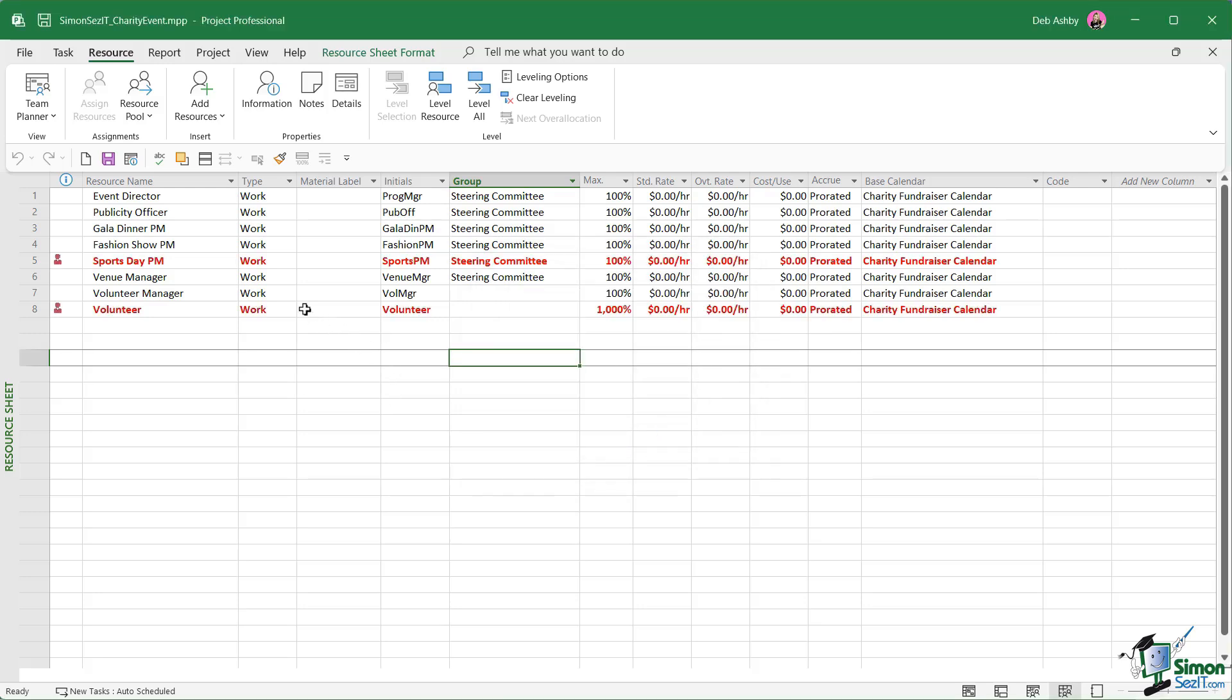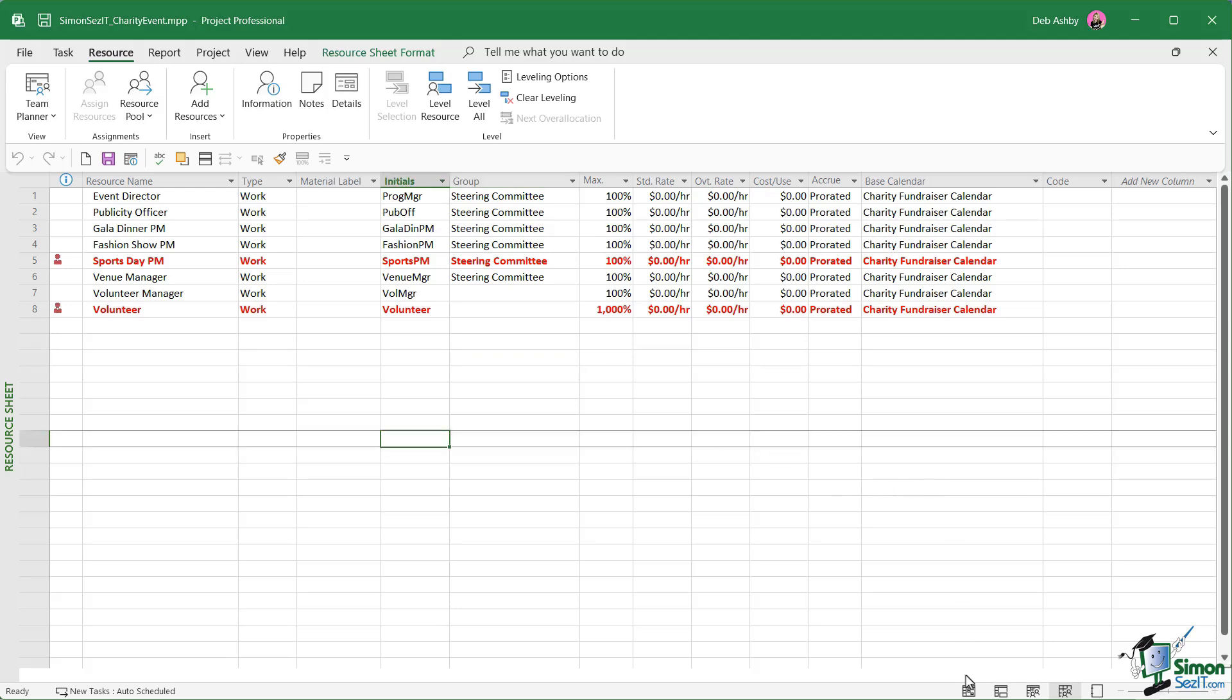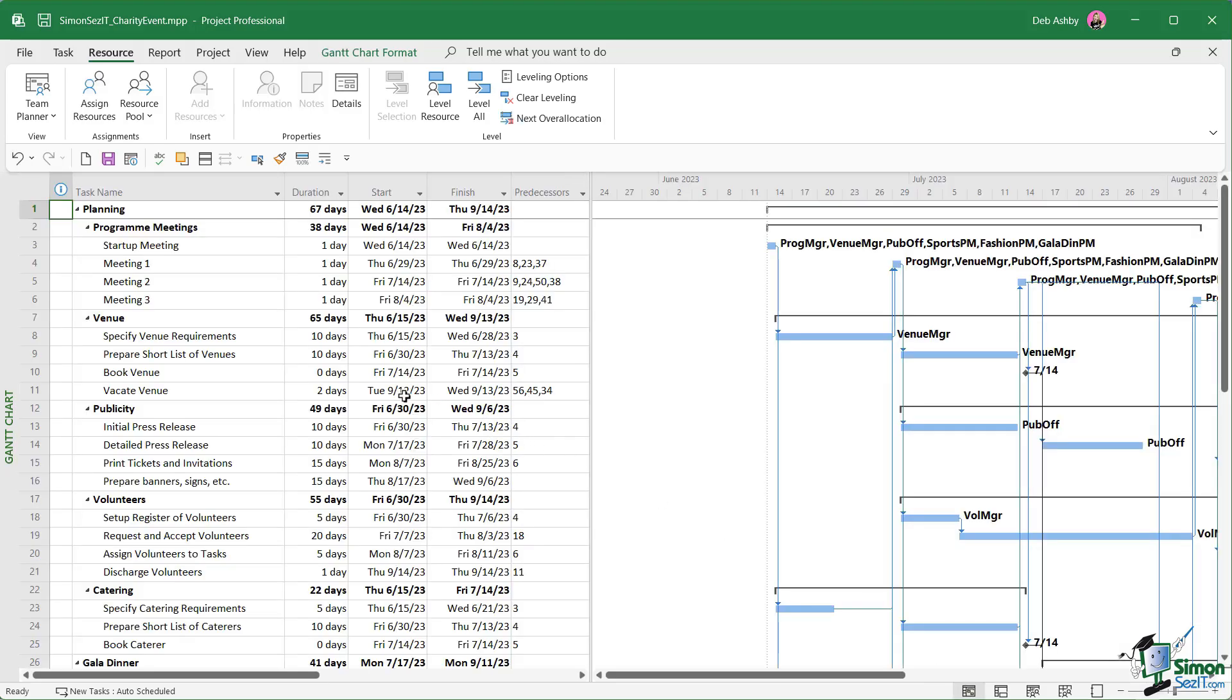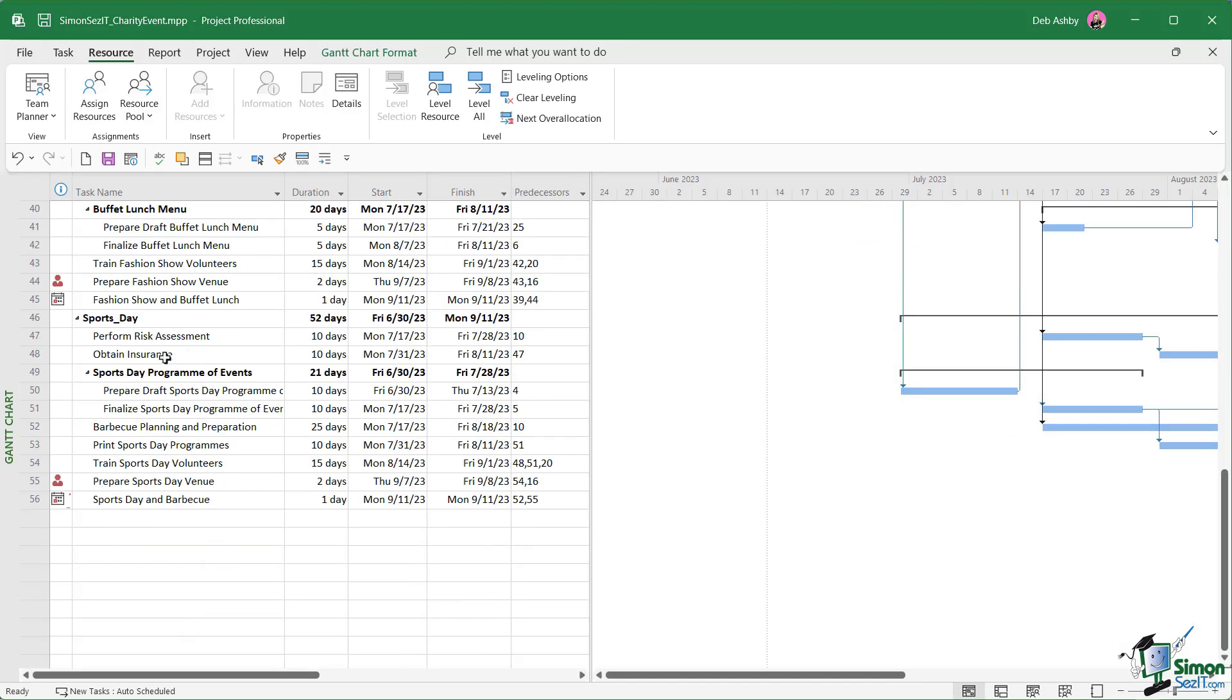That's really related to the fact that we have the sports day event in two different files. If you recall, when we copied the tasks across, we didn't delete them from the charity event file, which is why we've got these over allocations. We are going to deal with those in a moment. So just put that to the back of your mind. What we're going to be doing over the next couple of sections is that we are going to split this charity event project up because at the moment we've only sectioned off the sports day part of this event. But before we get onto that, just one or two important points about resource sharing.